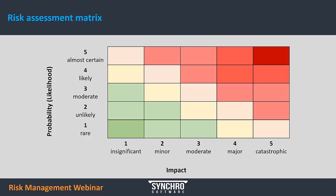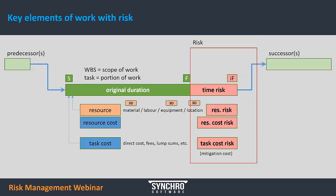Okay, very good. Here's the last question: in Synchro, do the risk items only feed into the Gantt chart, or can they be fed into the resource properties too? Yes, they are strictly assigned to tasks. They will first be seen in the task properties and managed from this functionality, so they will not be seen in the resources. However, we can add additional resources to the task, which become part of the resource risk. So any additional resources we add to the task because of the risk — that will be our resource risk, or resource cost risk.